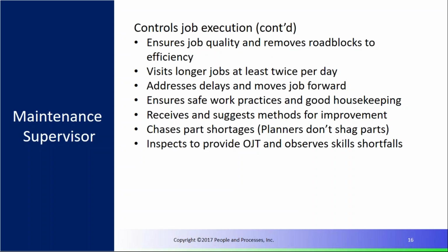And ensures quality. We talked about removing the obstacles. For longer jobs, like 8-hour jobs or something, we want the supervisor to go out in the field and at least visit those jobs twice a day, sometimes more. And how do we make sure that we're adhering to the company's safe work practices and good housekeeping? It's amazing when I go to some sites and you see cans laying on the floor, drink cans, other stuff like this, and you're like, wow, really? So it's doing basic housekeeping as part of that. And then how do we get better?